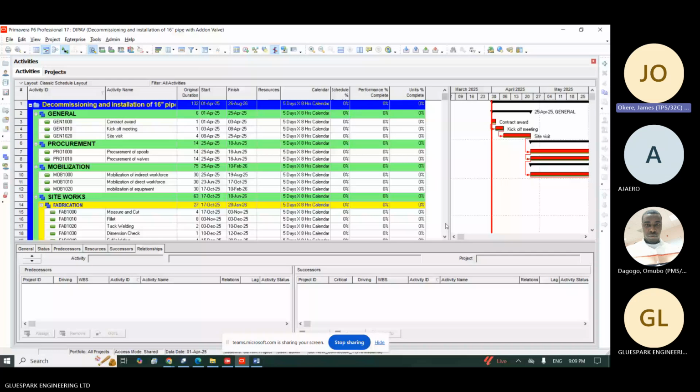So the productivity rate is that a mason can lay 75 blocks. It depends on the amount of blocks I have. So if I have 5,000 blocks, I just divide 5,000 by 75. If I divide 5,000 by 75, it will tell me how many days it will take one mason to finish the block laying, right? So if you run that as mathematics, 5,000 divided by 75 roughly gives us 67 days. So it means one mason can do this job in 67 days for me.